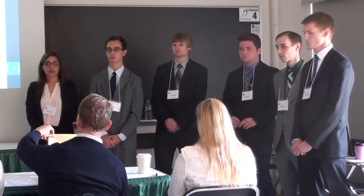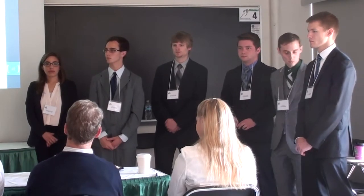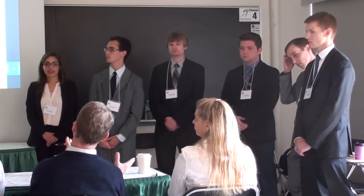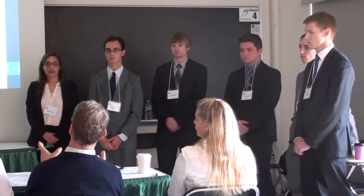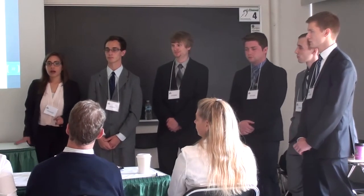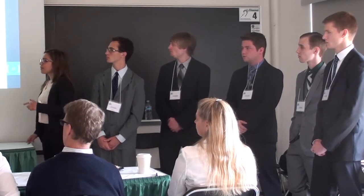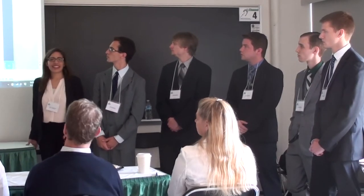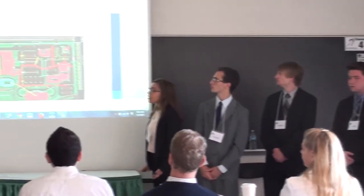Someone mentioned the area for the treatment, which has some high-end unit processes that are kind of expensive. $1.6 million for everything, which I'm assuming is all the water and sewer. How much of that was the water and wastewater treatment, out of the 1.6 million? The majority of it. I have a slide for the cost estimate. It was like 800,000 for just the treatment units. Just the equipment? Just the equipment.